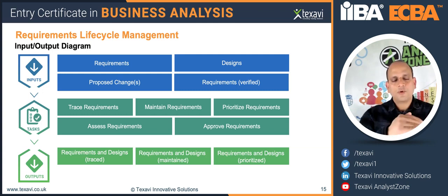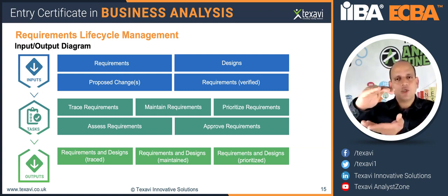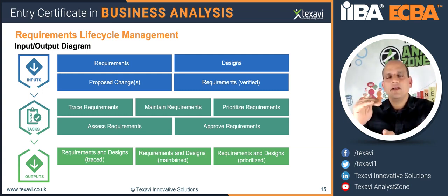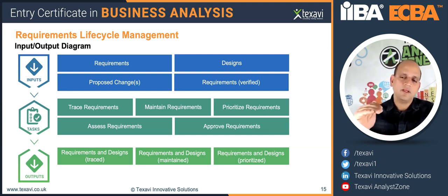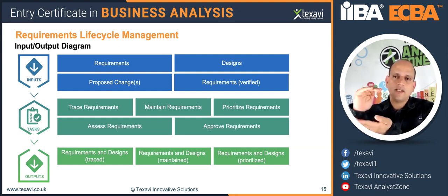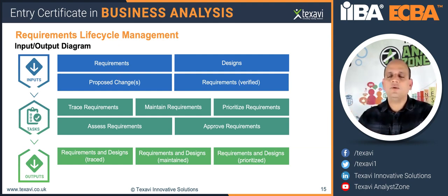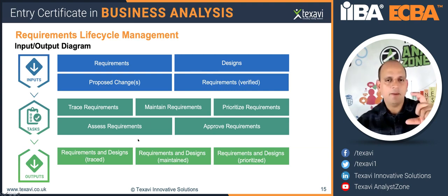Then once you prioritize some of them and then say, well, this is the short list of the prioritized requirements, defects, and the changes and stuff like that, the technical task items, that becomes your prioritized backlog, which is what we call a sprint backlog. So that gets into the development of the particular feature within that time box called sprint.